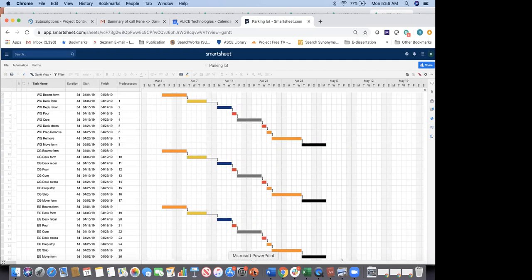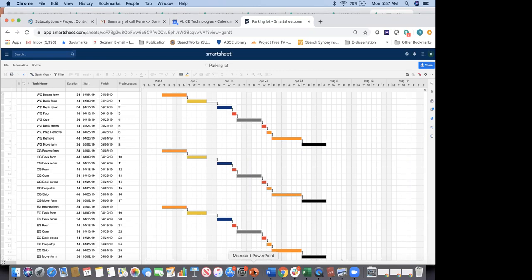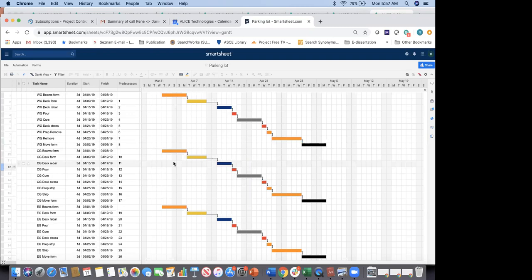Now that we've taken a look from a theoretical perspective, we actually get the students to do this painfully — going in and scheduling with one crew of each type, two crews of each type, trying different sequences. They come back and say, 'Well, that was hard.' In our first assignment, we also had them do it manually. Would anybody like to guess how many lines of code it takes to code CPM to do the forward and backward pass? The answer is actually 16. You've got 10% of all GDP — around $9 trillion worth of construction — sitting on top of 16 lines of code.